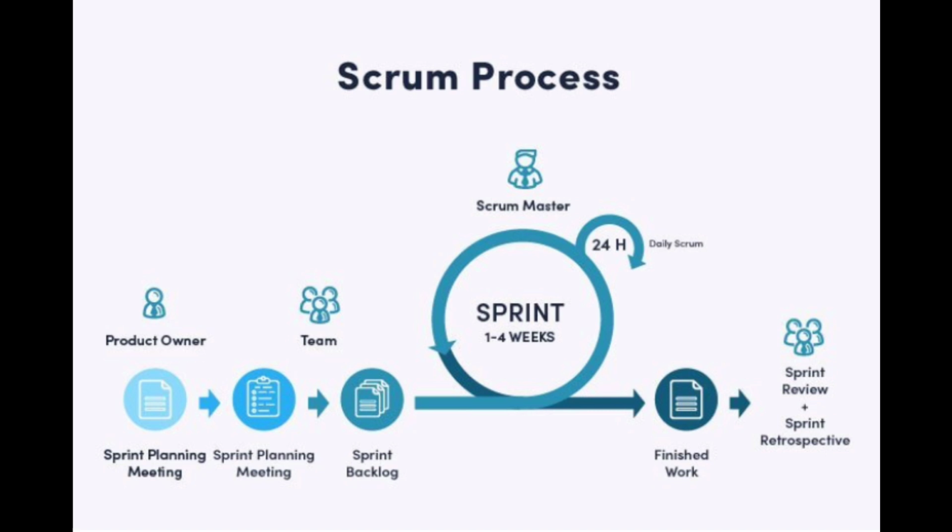Then there are other Agile ceremonies like the sprint grooming session, where we connect with the whole Scrum team like business analyst, product owner, dev team, SIT and UAT, and we conclude how complex a particular user story is and how big it is. Based upon complexity and user story size, we give user story points. Once we are done with the sprint grooming session, we move those user stories to active sprints.